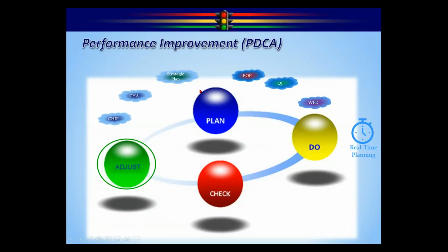Now, if I go back to the PDCA cycle, at this point in time, we are going to want to make adjustments. The other adjustments that you could possibly make, other than the first one we saw where you don't really need to make an adjustment, is we could potentially adjust the plan. So let's take the scenario that we're coming into COVID time. We realize it's going to eat up most of the resources in the department. We probably won't be able to add any additional resources to get to that 25%. But maybe if we're happy with the 21% for now, we'll adjust the plan to 21 so we have success, go through this plan until COVID's over with and we can get back into it. So that's one option, adjust the plan.